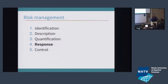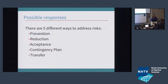In the example of a risk you see coming: you know its proximity, you know you can't avoid it, so the probability of it happening is 100%. The question is: what do you do? How do you prepare for that event coming? Workaround — a plan B type of thing. We had prevention, we had ignoring slash acceptance, workaround, contingency plan. Then there's also reduction and transfer.